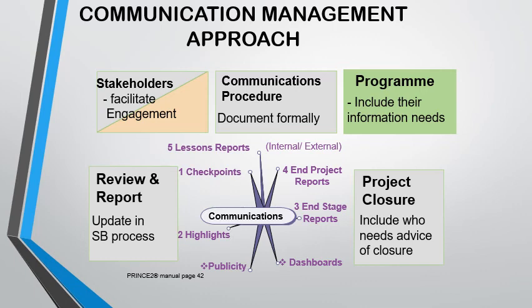the stage boundary. And of course, how project closure is going to be managed also has to be mentioned in the communication management approach. So basically, everything that has to do with communication comes under this document, and it's also part of the documents that go into the project initiation documentation during initiation. Let's go on.